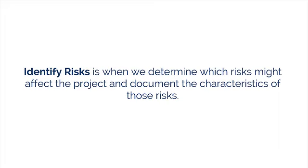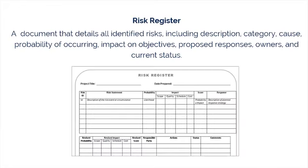Just be prepared for lots of tools and techniques in this process. However, there is a single output. The one thing that we want to come out of this process is the risk register, which we define as a document that contains a list of the identified risks and a list of potential responses.